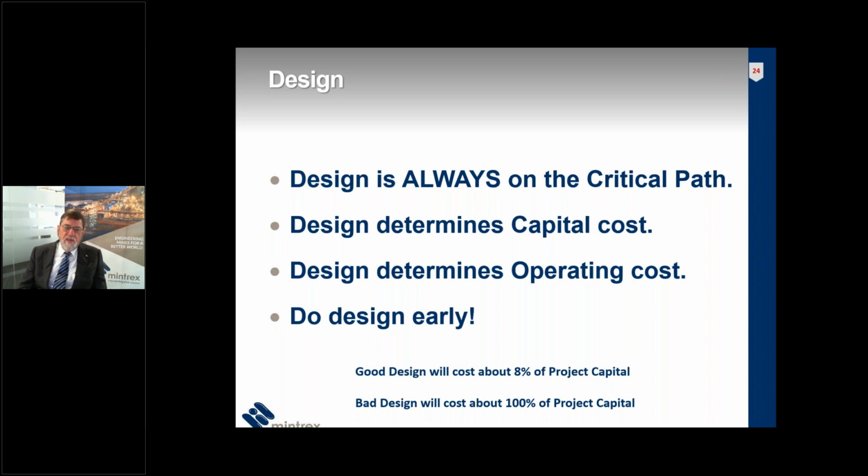What you need to keep in mind is that bad design will cost you the whole damn lot. Bad design wastes everything that comes after it. So it's worth remembering that design is always on the critical path. Doing design early de-risks.